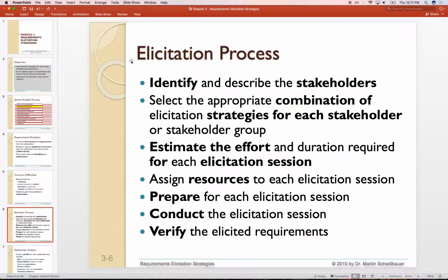And then depending on the stakeholders, you'll need different strategies, right? Of perhaps a little bit of brainstorming, a lot of some one-on-one, face-to-face conversation, some forms that we're gonna send out for you to fill out. So there'll be like 20 different strategies for eliciting the requirements, and depending on their availability, you'll have to decide what combination of strategies you are going to use to gather the requirements from these folks. And you're going to have to time box a little bit what the time effort is going to take, right? On how long do you think the whole effort of eliciting will be, right?